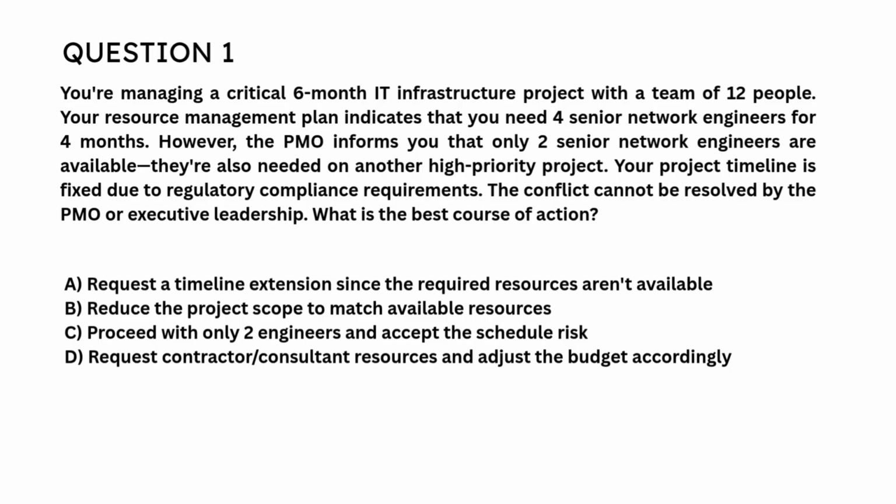A. Request a timeline extension since the required resources aren't available. B. Reduce the project scope to match available resources. C. Proceed with only 2 engineers and accept the schedule risk. D. Request contractor, consultant resources and adjust the budget accordingly. Correct answer is D. Request contractor, consultant resources and adjust the budget accordingly.